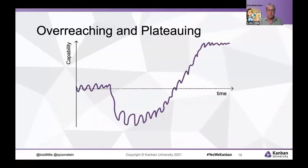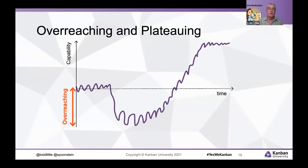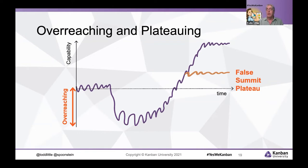Overreaching is taking on too big a change, putting the organization at great risk of not being able to realize the intended results. Plateauing is where you get through the hump, feel the transformation was successful, you're better than before, and never want to go through it again — but that new happy place is nowhere near what's actually available, leaving significant benefits on the table. The Kanban Maturity Model approach tries to remove both of these problems through evolutionary change.